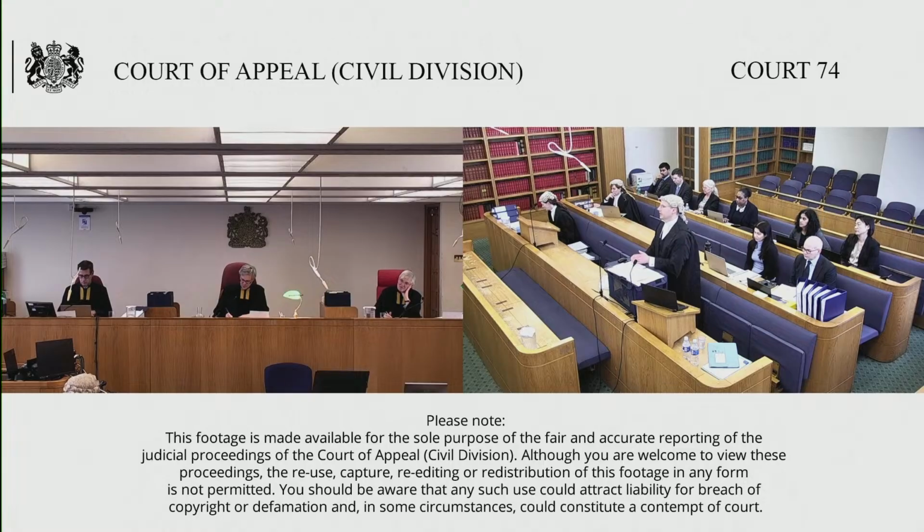Now, if I've understood that correctly, then that seems to boil down to a timing point. I think even HMRC would accept that checking for things like unexploded ordnance has to be done before the monopile is driven into the seabed. There isn't much point checking after that stage. Now, if that's qualifying, why does it matter, given that it's accepted that the time of expenditure doesn't bear on the question of whether it was on the provision of the plant? If that counts, then why does it matter whether the check is done 5 minutes before, or 5 days before, or 5 months before?